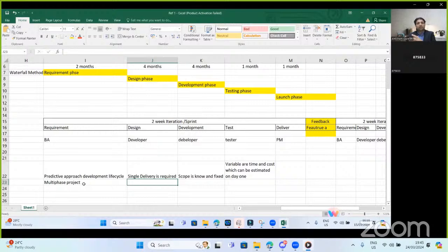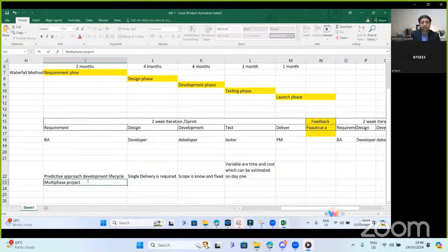However, we can say that we have a phase of the project in which we deliver a residential building, which can run for a year. Then another phase of the project, which can be another 6 months, we will deliver a shopping mall. And within the same complex, within another 6 months or a year, we will deliver the park or a parking lot or a mosque, or a church, whatever is part of the scope. So I'm just building up one more type of project approach, which is the phased approach, where we do have a single delivery, but we have different phases of 6 to 8 months.